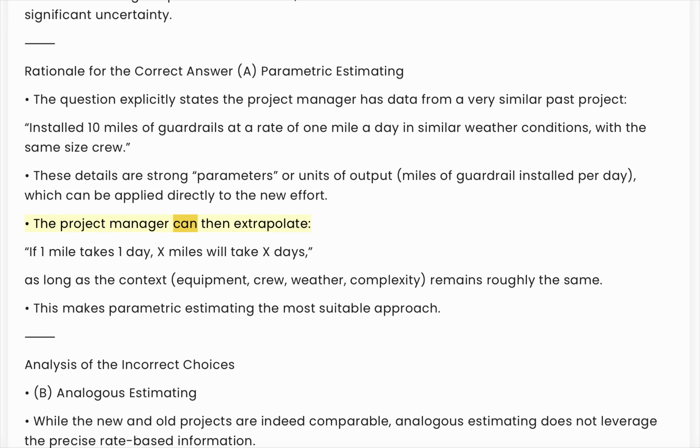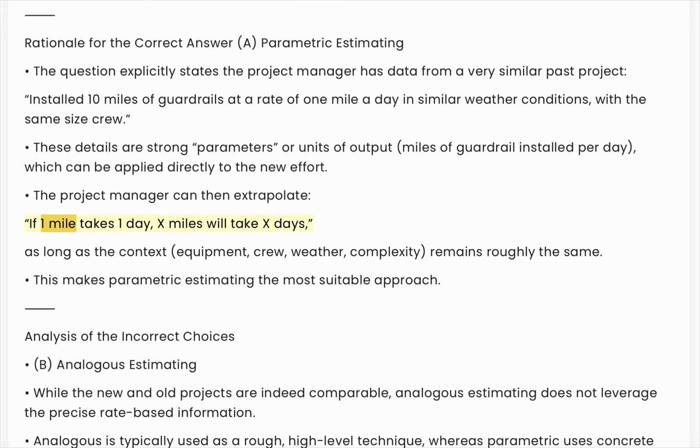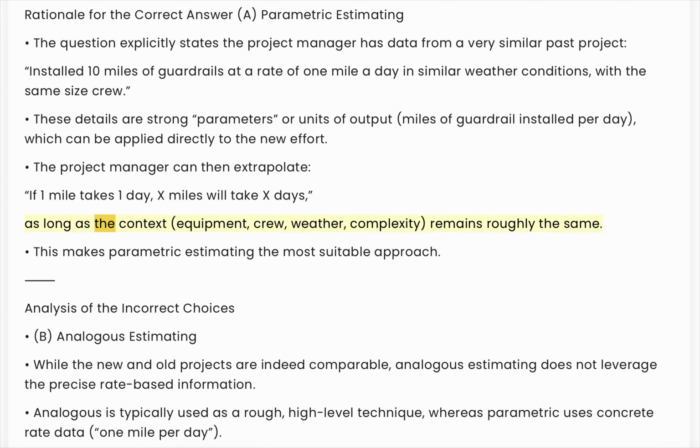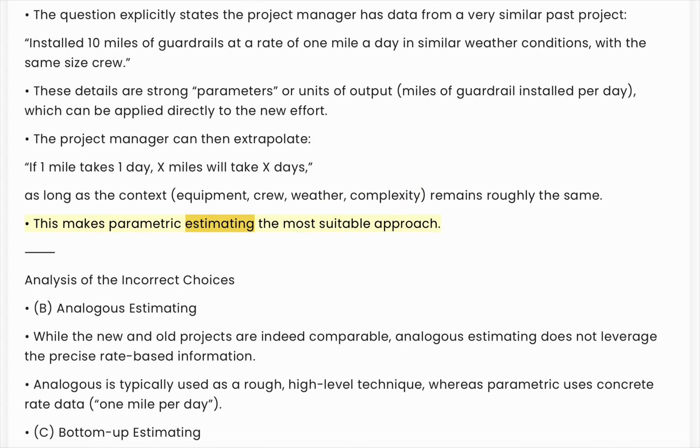The project manager can then extrapolate. If 1 mile takes 1 day, X miles will take X days, as long as the context, equipment, crew, weather, and complexity remain roughly the same. This makes parametric estimating the most suitable approach.